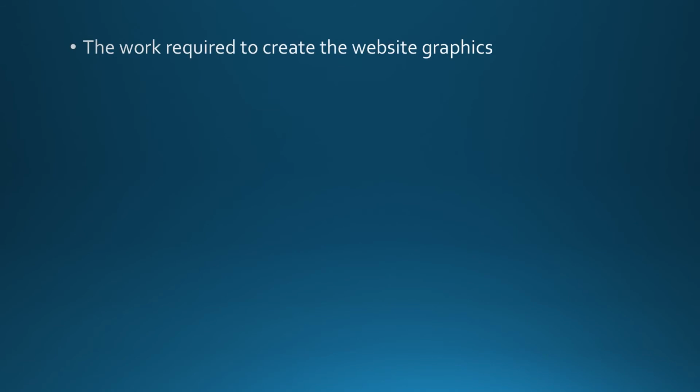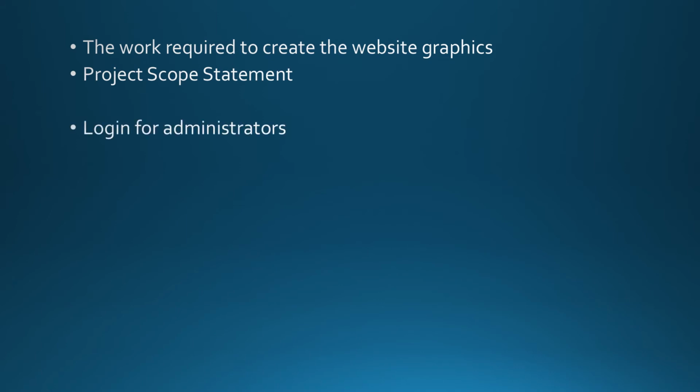The work required to create the website graphics. Again, we are talking about the how here. How you are going to create the website graphics. What is the work required? That goes into the project scope statement.